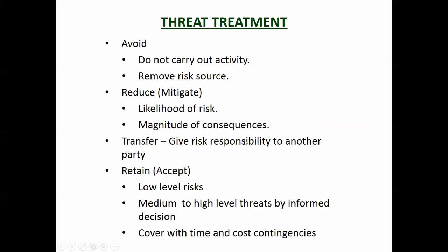Other risks, such as an accident causing significant financial harm to the client or to the contractor, could be transferred. In other words, you insure. So you'll see that most construction contracts require the contractor to insure the contract works. If it burns down, there's a risk that the contractor could go broke. So you get him to insure the works, so that if it does burn down, someone else is paying for it. You've transferred the risk.